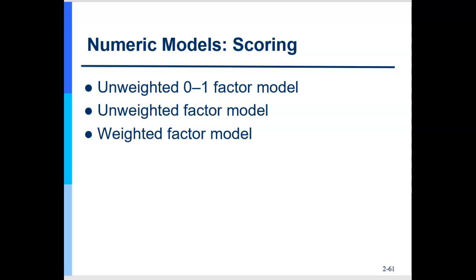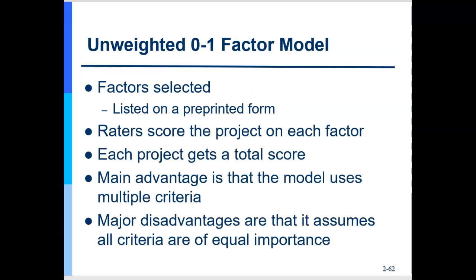I like weighted scoring models the best because, now, if you needed a scoring model and can't weight it, that's fine, use it. But a weighted scoring model lets me say, you know what, I know not everything is equal. So maybe I'm buying software and not everything I need in the software is based on quality. Sometimes it's based on reputation, etc., right? I can weight those and make sure I'm getting the right product for the money, right?